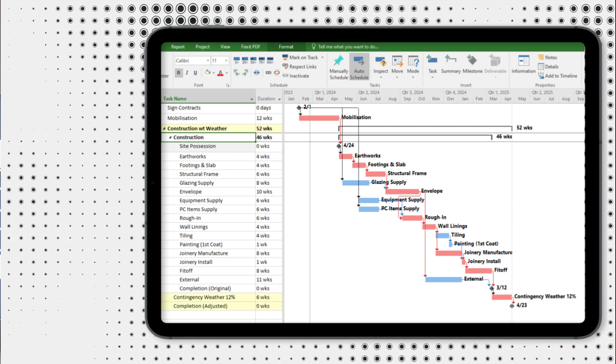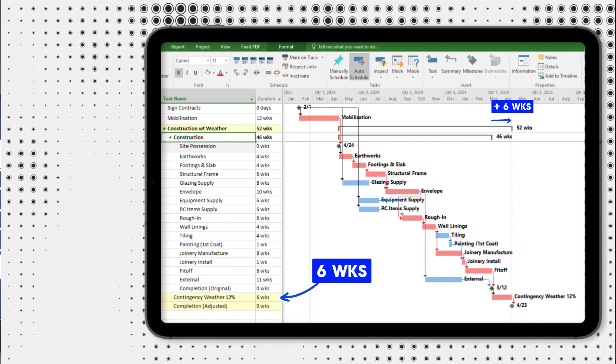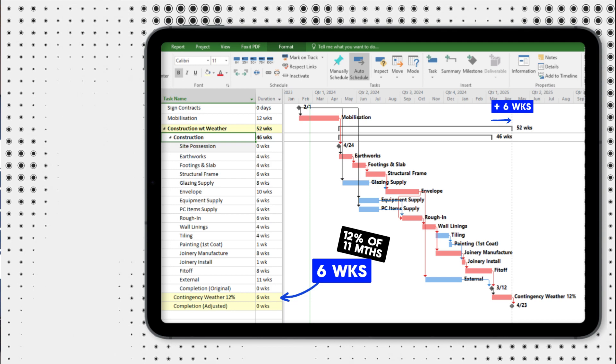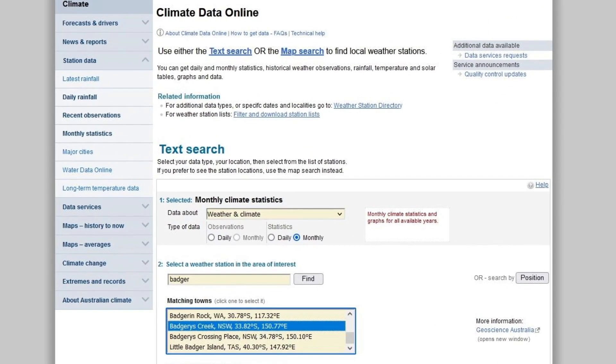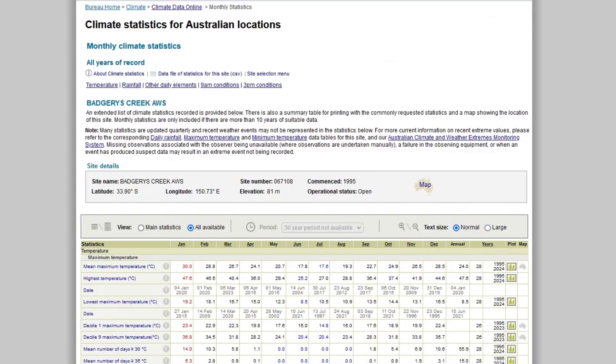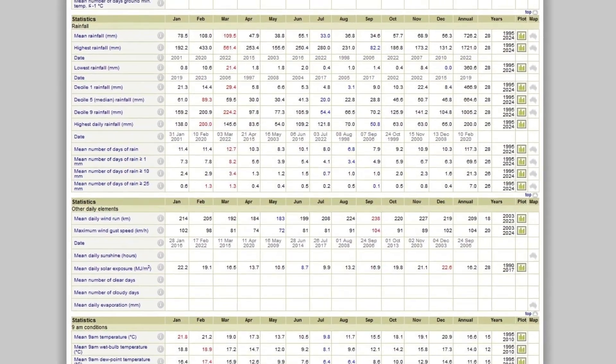In this example, I've scheduled six weeks of project contingency, which is about 12% of an 11-month program. In terms of rainfall and how much to expect, builders and project managers often use the Bureau of Meteorology — known as the BOM in Australia. Searching weather stations in Sydney, I've selected a station near my site. Under statistics, all available data, and scrolling down to the rainfall section, this station actually has 30 years of data summarised.